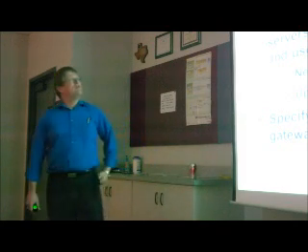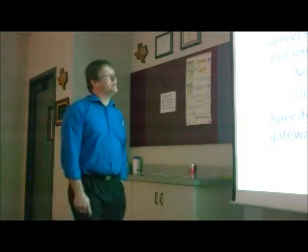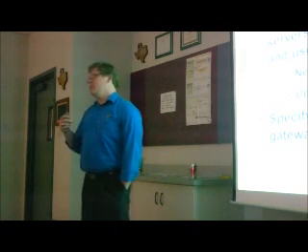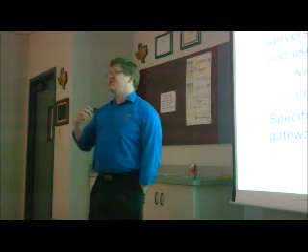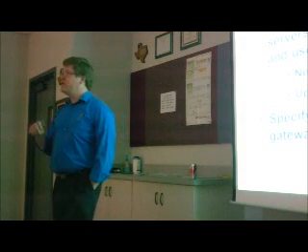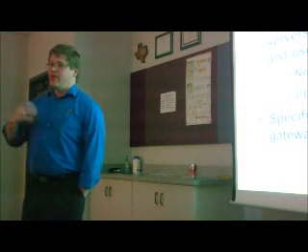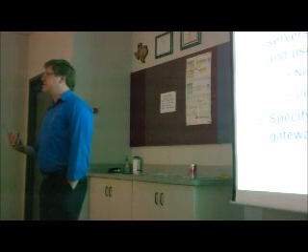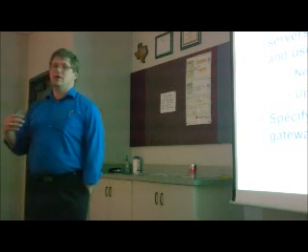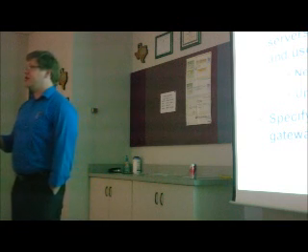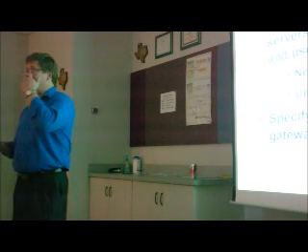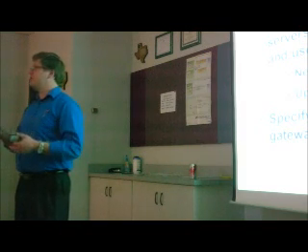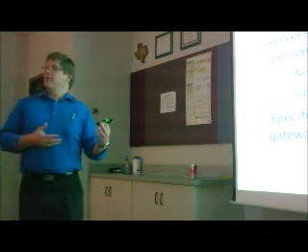Technology design, development of a physical network or set of possible designs. This is what I was talking about earlier when I said the project that's posted online, that's probably one of the weak spots in that particular one. They had a design that they came up with, and they did a financial analysis for that particular design, but they didn't provide alternatives. Ideally you'd have probably 2 or 3 different alternatives, which means 2 or 3 different designs, and then you could make a comparison.